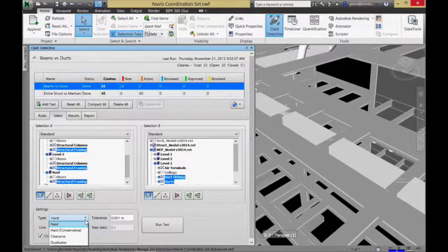and some sort of clash, whether it's a hard clash. A clearance clash is an interesting one you should know about. That's the whole notion that I'm going to have two things pass by each other, but there's a bubble of clearance around that element that we want to leave clear. We don't want to have anything interfering with that. So you can specify so many millimeters, so many inches of clearance around a piece of piping or around some hot element where you need to have some sort of insulative space between so that you don't have some sort of a heat transfer issue.